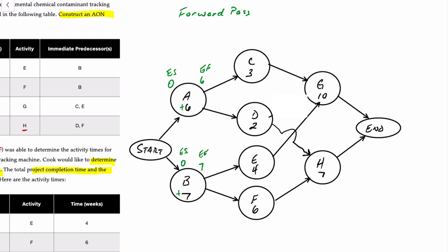Going back to activity A, both C and D come after it. The earliest finish time from activity A becomes the earliest start time for activity C — ES of six plus three equals an earliest finish of nine weeks. For activity D, that six weeks also becomes the earliest start; it takes two weeks, so the earliest finish is week eight. Looking at B, the earliest activity E can start is seven weeks; it takes four weeks, so the earliest finish is 11 weeks. F can also start in week seven; plus six weeks means the earliest it can finish is 13.